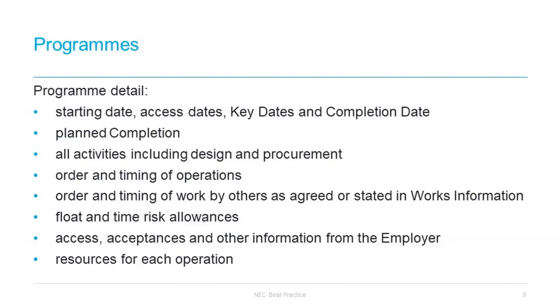For the activity schedule options, there also needs to be quite a good link between the programme and the activity schedule. The reason for that is that it then ought to make it fairly non-controversial when you have achieved each activity within the activity schedule.